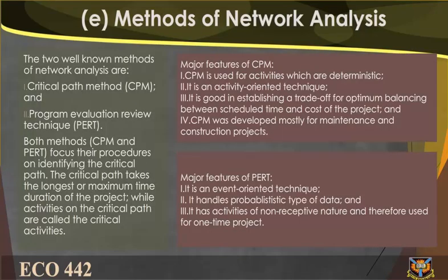E. Methods of network analysis. The two well-known methods of network analysis are 1. Critical Path Method (CPM) and 2. Program Evaluation Review Technique (PERT). Both methods, CPM and PERT, focus their procedures on identifying the critical path. The critical path takes the longest or maximum time duration of the project, while activities on the critical path are